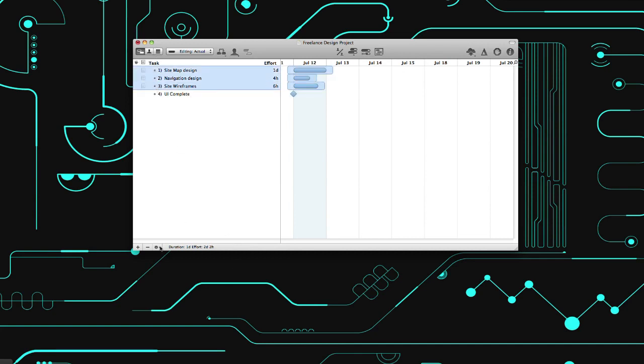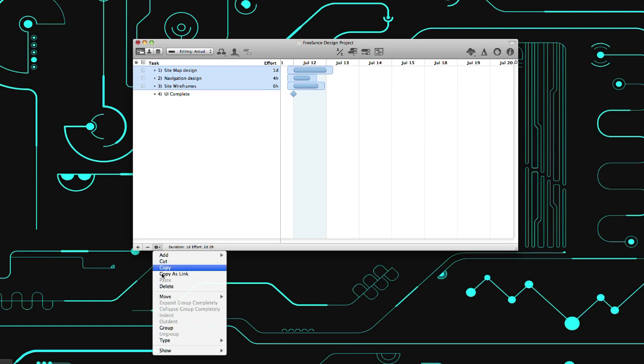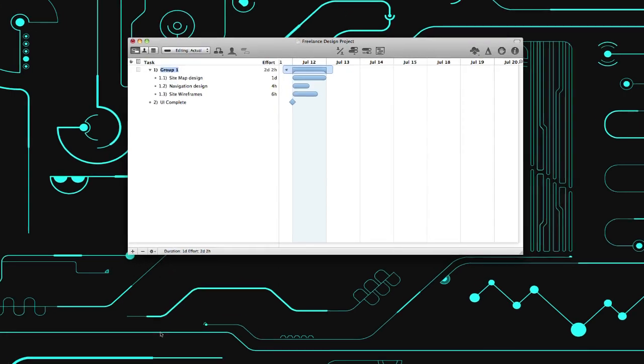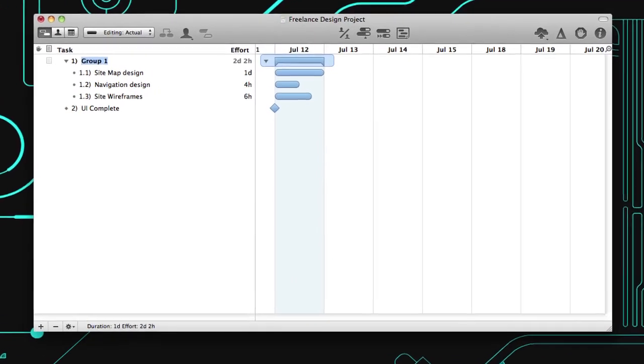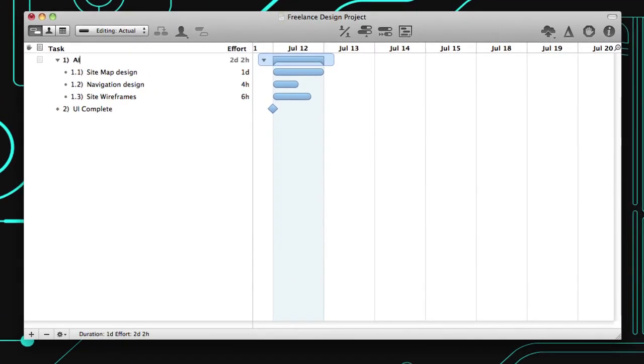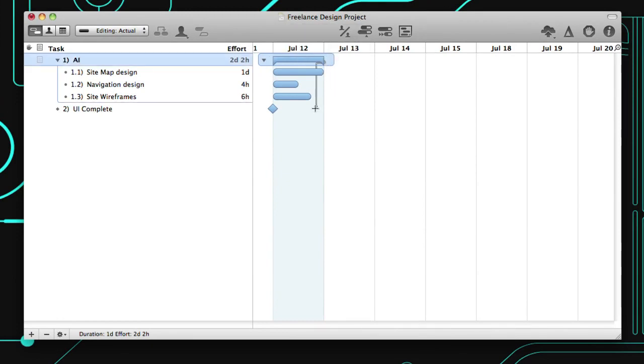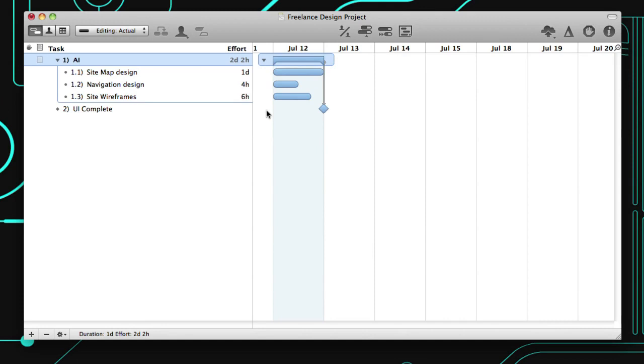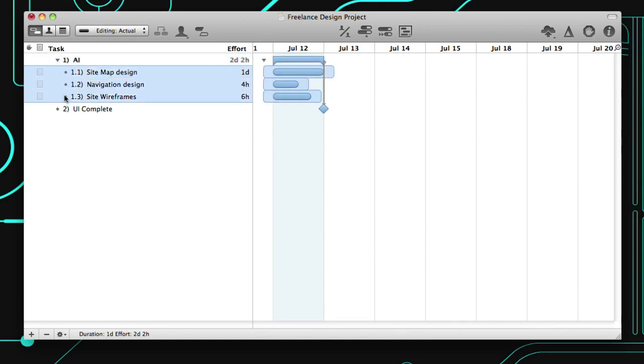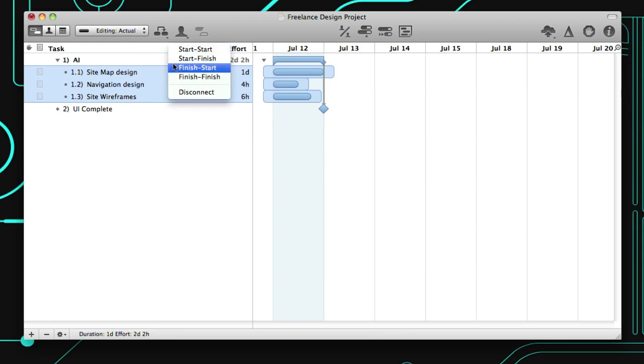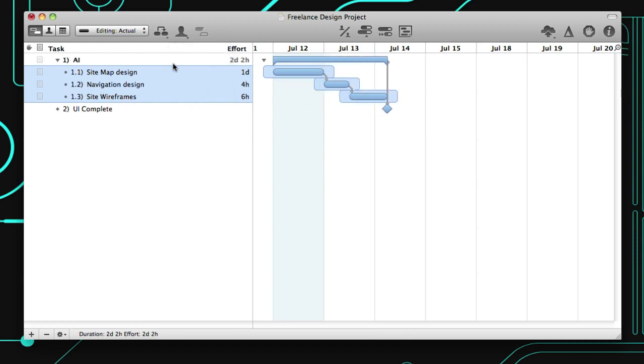Of course, most tasks require another task to be finished before the next one can start. Just click and drag the dependency line from the end of one task to the start of another. Or select the tasks you wish to connect, then click and hold the Connection button in the toolbar to choose the right type of dependency. As you connect tasks, they automatically shift along the Gantt chart to build a timeline.